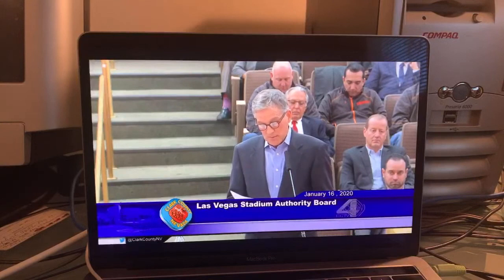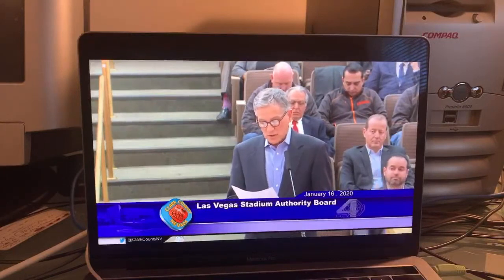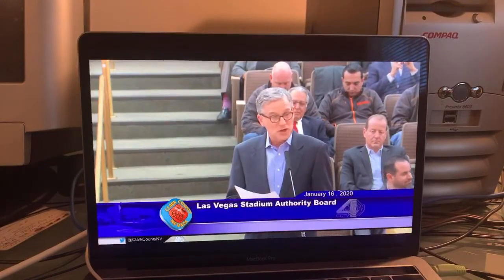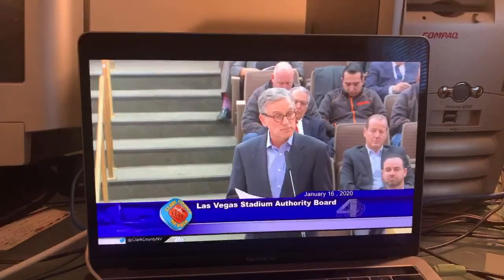And according to this same National Weather Service, the average rainfall during the additional month in which the ETFE roof remains open varies from between 12% and 16% of the rainfall that was actually experienced in December. So if December's double the normal rainfall had virtually no impact on the completion schedule, then surely a month with a small fraction of that rainfall will not be a showstopper either. And bear in mind that in December, less than 60% of the exterior glass wall was in place, whereas it will be fully in place in March.